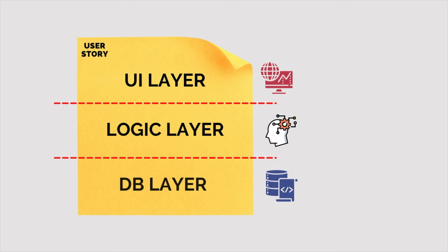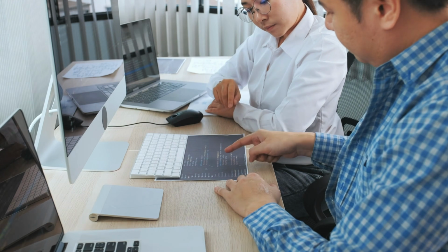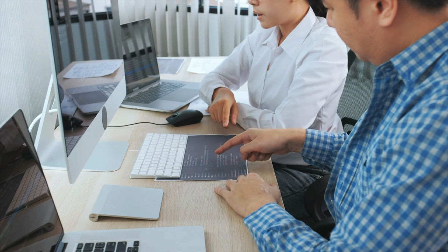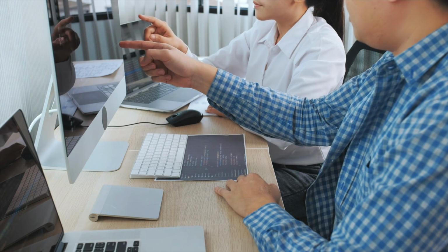In such cases, when you introduce vertical stories, you can expect the team to split those stories into tasks corresponding to those layers, and then distribute the tasks to different people. This can be very inefficient. The best way to resolve this is to tolerate it initially while making it clear that the long-term goal is to work on vertical shippable stories. You can slowly achieve this by having team members across layers pair program, so as to build cross-layer expertise, eventually enabling people to be completely independent.